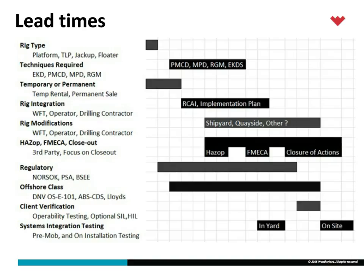On a floater, the lead times are even worse because more likely than not, these new floaters carry some sort of offshore class, whether it's ABS-CDS, DNV-OS-E101, or whatever Lloyd's is going to come up with. These class requirements sometimes mean we can't use existing equipment — we may need to build brand new equipment to meet a contract or test and verify it in a different way. The rigs have class when they leave the shipyard — they're surveyed, inspected, engineered, and verified at a very high level. Once it leaves the shipyard, whether that class is maintained or not is hard to say; some do and some don't.